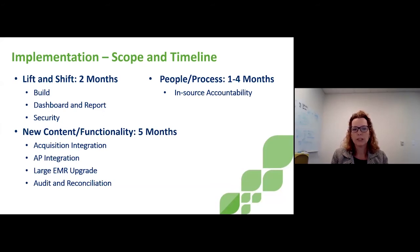We also did additional AP integration. We had a really large EMR, that's Enterprise Medical Record, upgrade. In fact, they changed their ID structure. You can imagine how changing the patient ID structure would really affect things. We went from 2 different ID structures into one, and we had to manage both of them at the same time as we transitioned. I told you we had 21 hospitals as we move every hospital from 2 ID structures to 1 ID structure. I know that's super in the weeds, but it's not just moving. I have to move and maintain both at the same time, so that made it complicated.